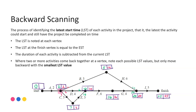So 2 goes in the box to help me keep moving. To finish off: 2 minus 2 for A gets me back to 0 at the end. It's really important to note - if you've done your backward scan correctly you should end up back at 0, with double zeros in those boxes at the start point. If you don't, that's a flag to check that you haven't made an error along the way.